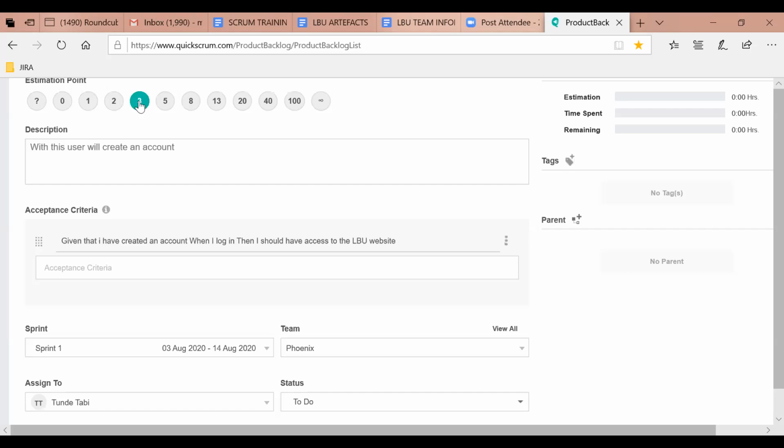So the experience of the developers is at play here, just like my experience as an orange picker is at play. When you bring 10 baskets to me, I will go back to the fact that it takes me 5 minutes to fill 1 basket. So now that you are telling me to fill 10 baskets, it's going to be 50 minutes. Is that correct? Yeah. That is exactly what is happening in the developing environment.